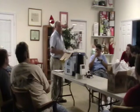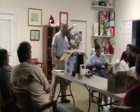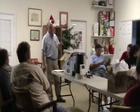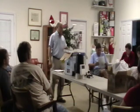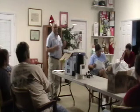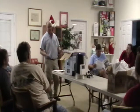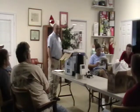But one of the questions is why the WeatherLink, and I'm going to pass around the article. I've got about 15 copies that you can have. They did an analysis of 4 or 5 different weather stations. They didn't like the price of the Davis instruments, but they did like the reliability. To us, if I'm spending the difference between $400 or $500, when liquidated damages on a project may be $500 a day, that little bit of money difference is insignificant to me. We need something accurate, and so that's why we went with the Davis.